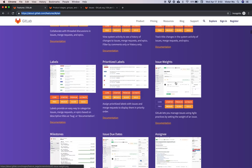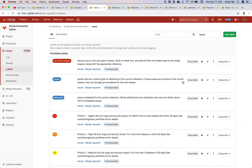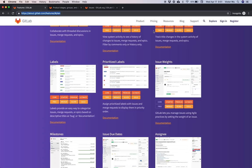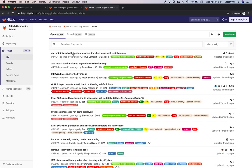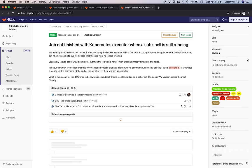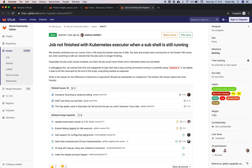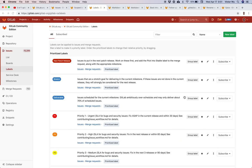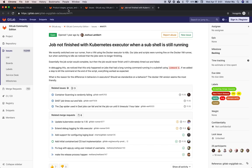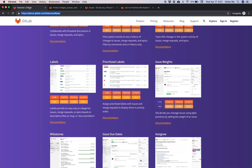Issue weights are used for story points and other equivalent systems for estimating effort. You can go into any issue and add an issue weight, and it will show up in a variety of places including issue boards and issue lists, showing sums of weights.